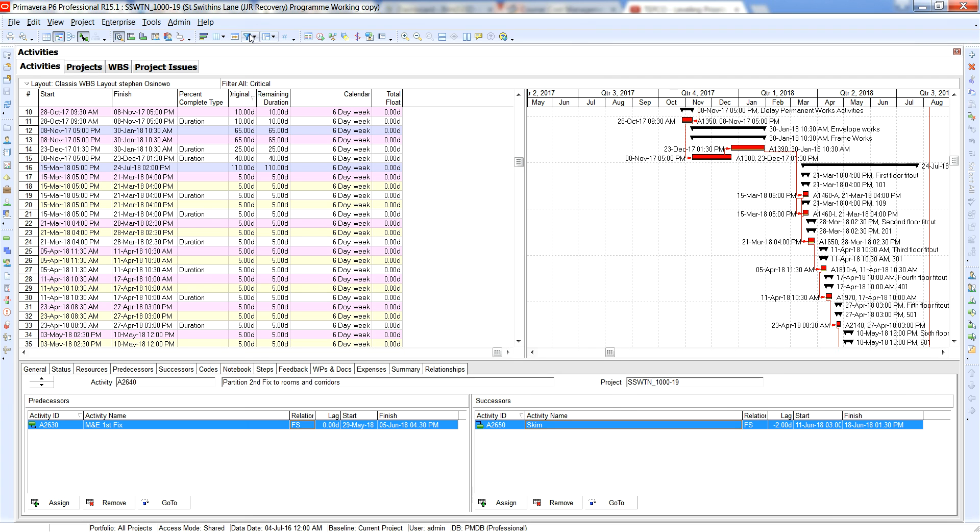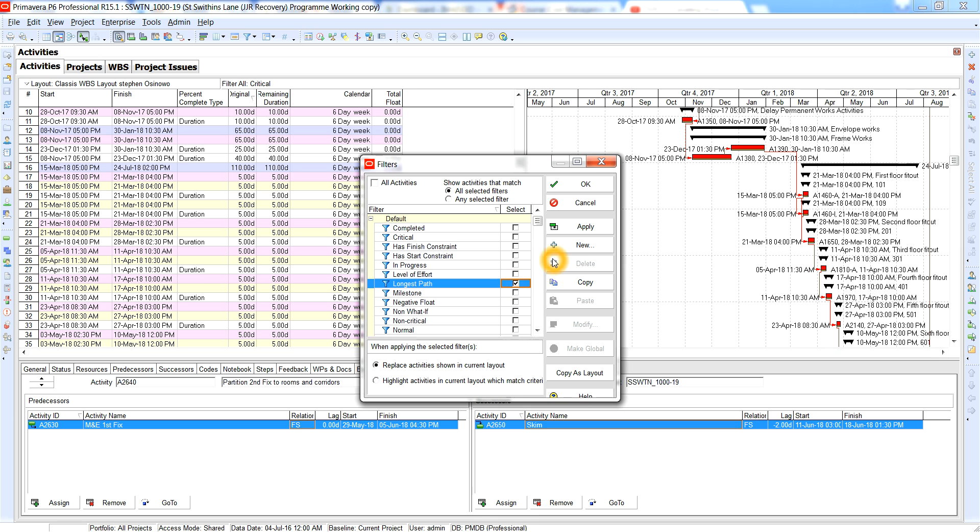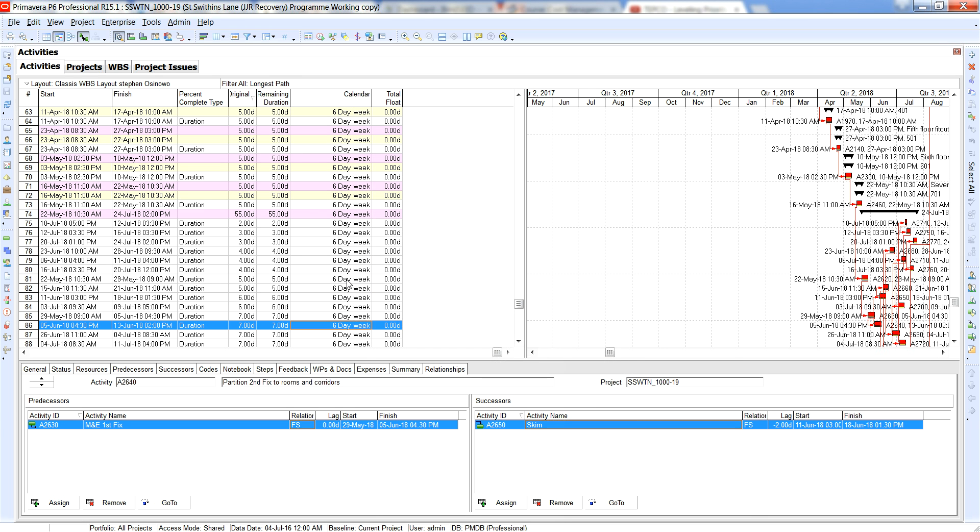So what I would usually advise is that as a planner you should always look at the longest path because that's the sequencing or logic of activities that make up the longest duration to the end of the project, whereas the critical path is the critical activities all of which have a total float to zero.